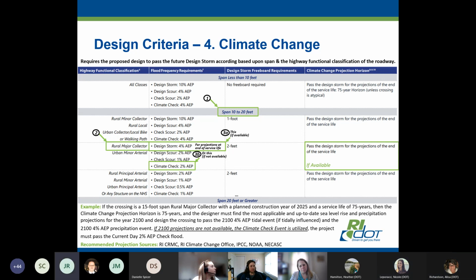I think Jody has his hand up. Yeah, can you hear me okay? Yeah, thanks for running through this. It's a lot of information, so I'm not sure where to begin. My question is more process-wise, and it leads from Danielle's point. From the project management perspective, right now we have the project in scoping. So we have a scoping consultant working on a lot of our initial work, and they would do the CE and bring it up to, let's say, a 30% level. And then we hand it off to the final consultant to take it from 30 to advertising and construction.